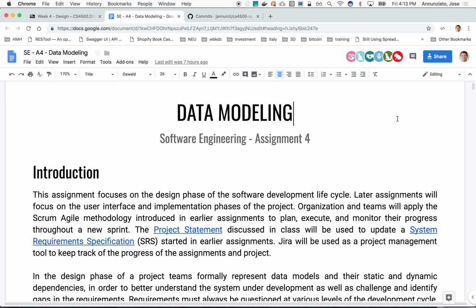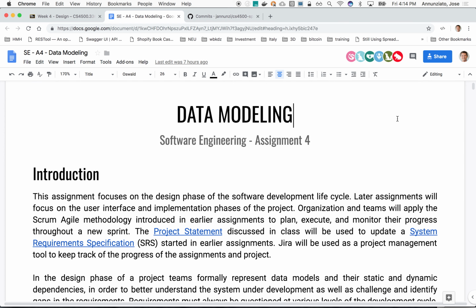We realized that we were not going to hit or complete something, and we might have created a separate story and said, well, this should have been 2 or 3 stories, so I'll really only do this one, and these other 2 stories I'll put in the backlog, and we'll add them in the next sprint. We might have been over-optimistic. It might have been assigned to the wrong person. The system was not ready. The machine could not install the environment. It's very common, and all sorts of things might have happened. So yes.